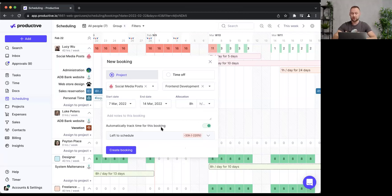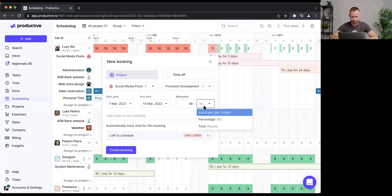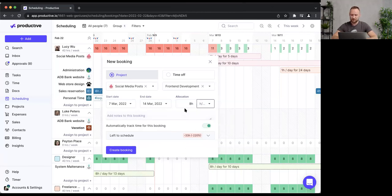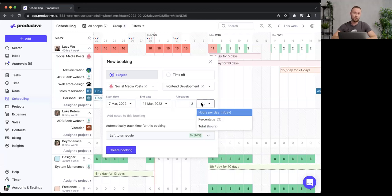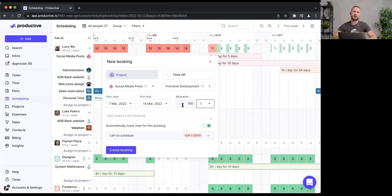Now I need to define how to allocate Lucy's time. I'll click on Allocation and select a booking method. The first option is hours per day — for example, eight hours across this seven-day span, though that's changeable. I can also use percentages, which takes into account Lucy's actual capacity.